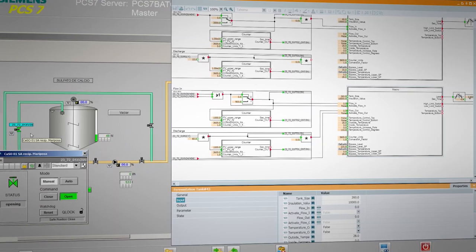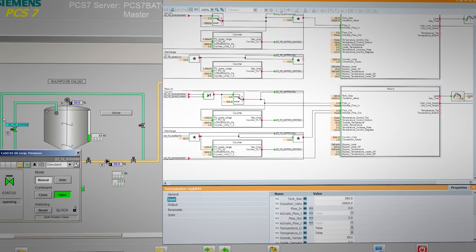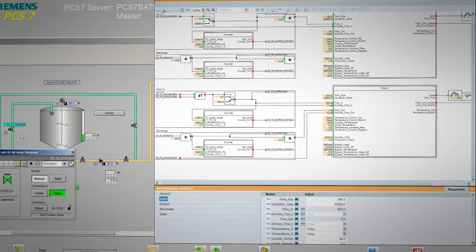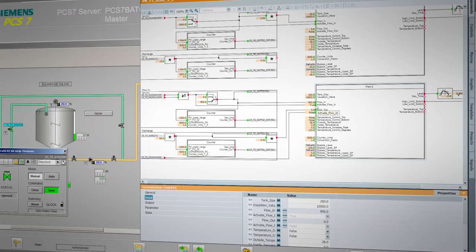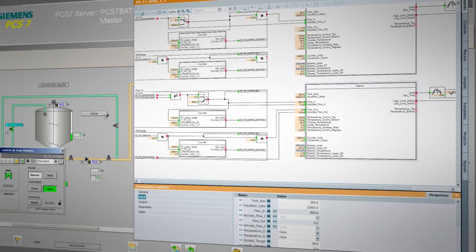By doing a process simulation using SIMIT, it allows you to test multiple scenarios and repeatability, so when you get to commissioning, the commissioning is more efficient and you've already tested different scenarios, and operators and maintenance can test those scenarios with you. The testing in a controlled environment is a risk reduction in the actual plant and faster commissioning